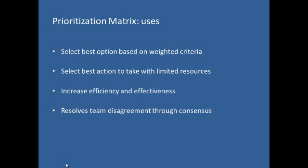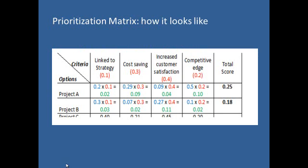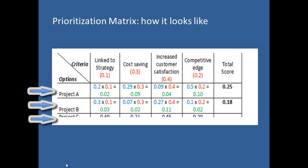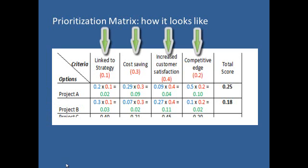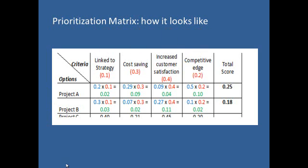Let's see what a prioritization matrix may look like. This figure presents a section of a prioritization matrix used to decide on the best Six Sigma project to initiate based on a set of criteria. We have projects A, B, and C, and we have the criteria that we hope to find a project that best satisfies it. We will rate each project on how much it is linked to strategy, how much it impacts the bottom line or cost savings, how much it affects customer satisfaction, and how it affects our competitive edge. Each criteria item has its own weight compared to other criteria items.